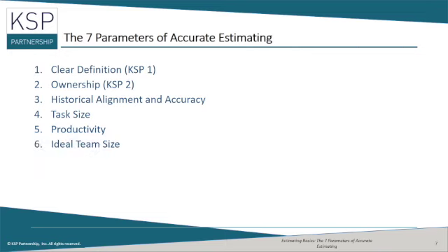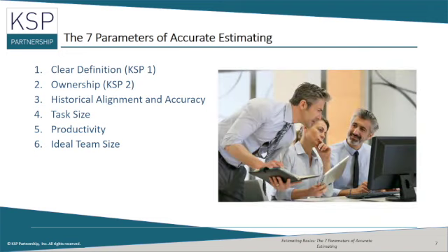Every activity has an ideal team size. Many tasks have an ideal team size of 1. If you're familiar with extreme programming, you'll profess an ideal team size for creating code is 2 programmers. If you've ever had somebody finish a basement or build a deck, you'll likely recognize an ideal team size of about 3 or 4, depending on capabilities. Less than 3 causes the team to lose efficiency, while with more than 4, they're starting to trip over themselves.